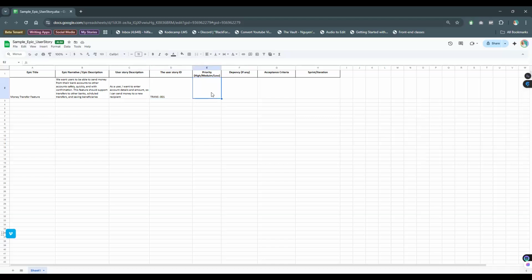And your priority here is going to be high, because this is a user need. Remember, we are user-centered. So the priority here is high. And then dependencies, there are actually no dependencies here because this looks like a fresh screen, right? The designer has to start this from scratch. He or she is not iterating, and there is nobody developing this screen already. So there are no dependencies here. There is none. So you just put that down.